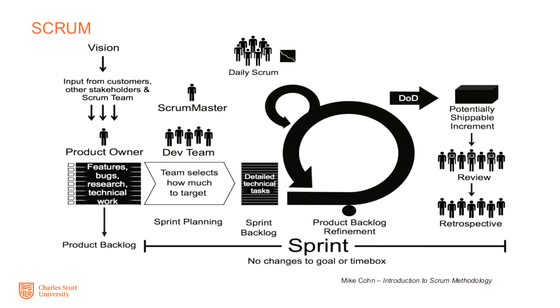I'll leave this slide for later reference, but it's a fairly standard sort of SCRUM approach. There is a Scrum Master and a development team, and the subjects come in to the sprint approach, which is the sort of circular piece here. There is a daily stand-up for the team. So the team would be a learning designer, digital technologist, and an online resource developer, all working together with the academic to get the subject ready to go. And then at the end, when the subject's completed, we would run a review, which is a process review and a retrospective on what went well from a process perspective.